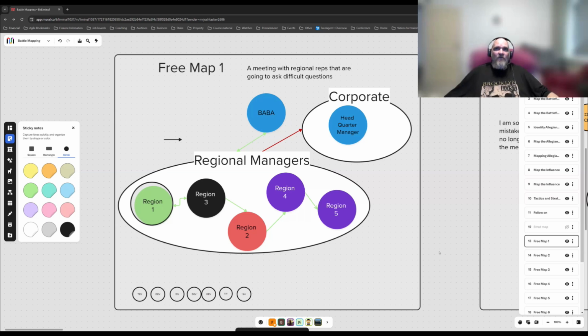Tactic number 2 was to preemptively ask for feedback before the meeting. What concerns do people have, so that you could find out exactly what the concerns were and walk into that meeting forearmed with hopefully some mitigations to their existing concerns, hence making the conversation and the meeting far more frictionless and far more positive.